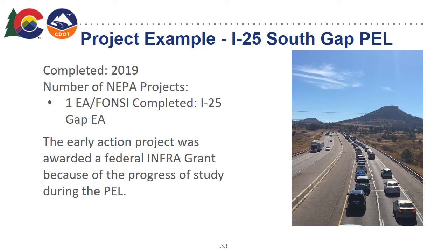The project was the addition of tolled express lanes along with substantial infrastructure improvements. And the stakeholders in the area were key in securing the funding and highlighting issues like vehicle-wildlife collisions that led to the inclusion of 4 wildlife underpasses as part of that project.